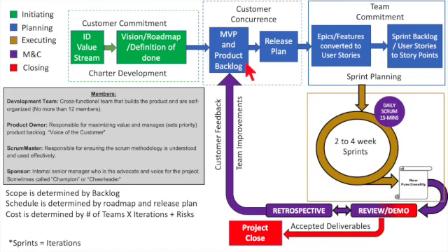Our product backlog you could think of as a list of required features in order for the product to be complete. However, the product backlog can change throughout the project. It can be added to or taken away from in terms of features based off the needs of the person that we'll call our product owner. The product owner helps the team determine what is actually needed in order to reach a finished state for the project. For example, in a product backlog, you might have 5 things that are required in order for the project to be finished. However, as you're working on systems within the project, the product owner or the team might identify an additional feature that needs to be added. It'll go into the product backlog and be prioritized based off the need.